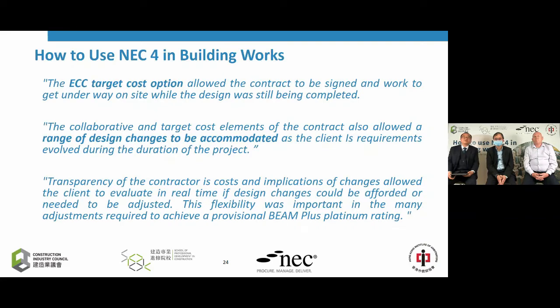The second comment: the collaborative and target cost elements of the contract also allowed a range of design changes to be accommodated as the client's requirements evolved during the duration of the project. The third comment is that transparency of the contractor in cost and application of changes allowed the client to evaluate in real time if design changes could be afforded or needed to be adjusted. So this flexibility was important in the many adjustments required to achieve a provisional BIM Plus Platinum rating.